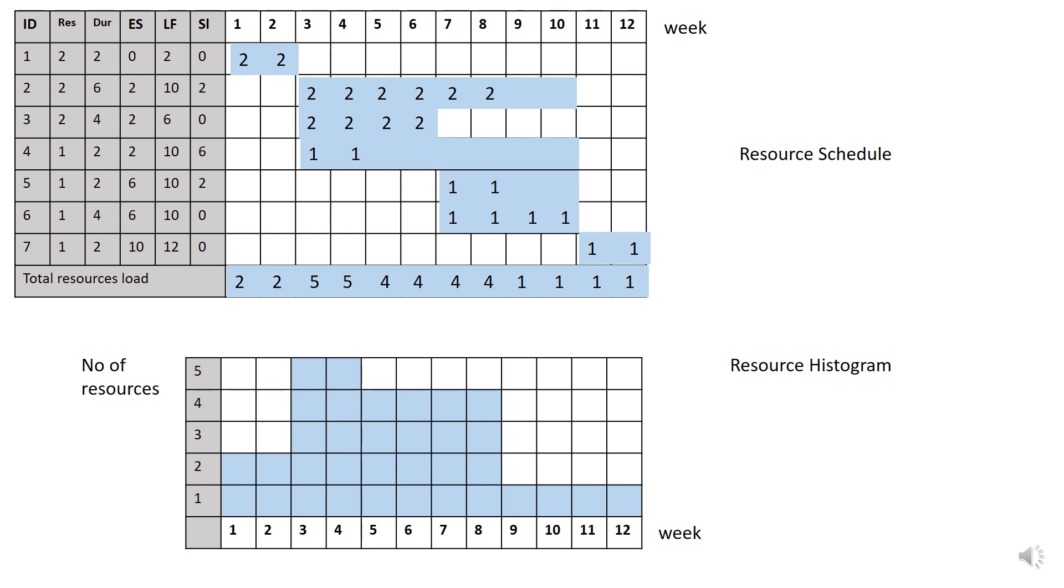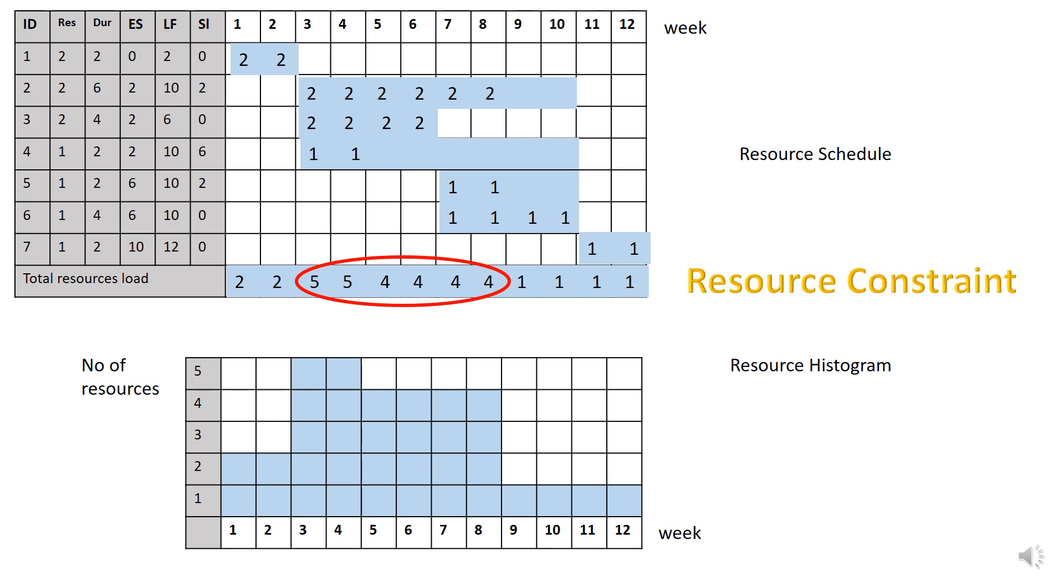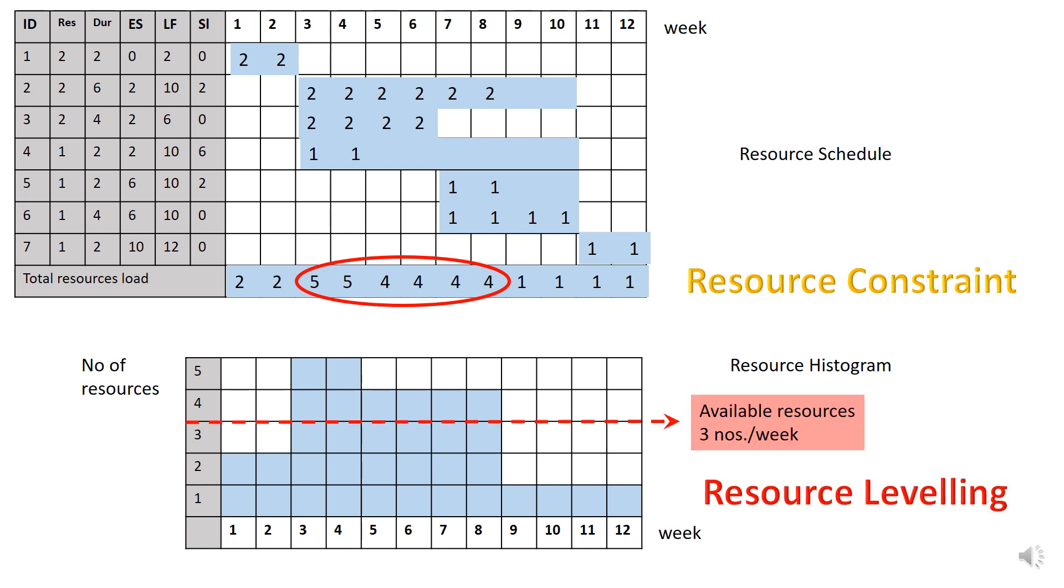So you also need to develop resource histogram. If you notice, resource required for week 3, 4, 5, 6, 7, and 8 is exceeded from the available resources which is 3 numbers per week. This is what we call as resource constraint. It is also indicated in the resource histogram. Therefore, we need to redistribute the resources back to 3 numbers. So how are we going to do that? We need to reassign the resources for each of this activity according to the available resources. And this is what we call as resource leveling or resource smoothing.